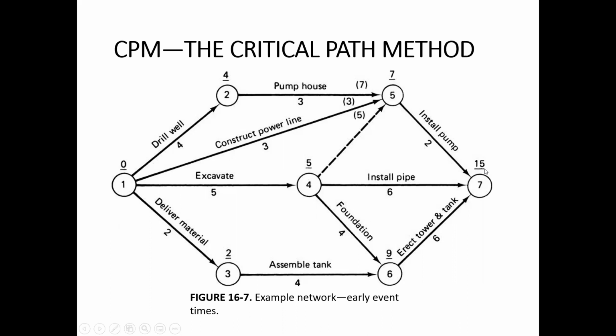Those numbers are days or weeks? Well, weeks. Okay. I may have said days, because I'm more used to saying days. But we have to be very consistent, okay? We have to be very consistent. If we are using weeks as the unit, we should use weeks. If we are using days as the unit for time, we should use days throughout. Weeks is more appropriate over here because of the size of the project which we can imagine.